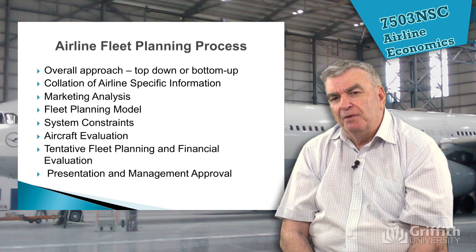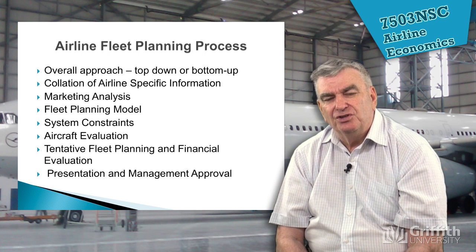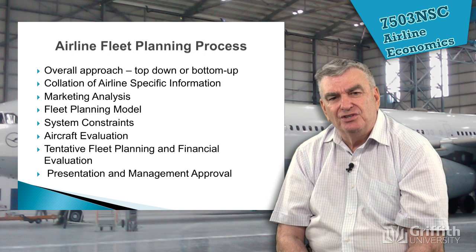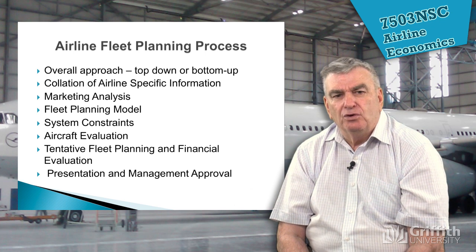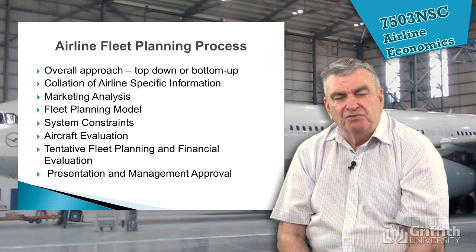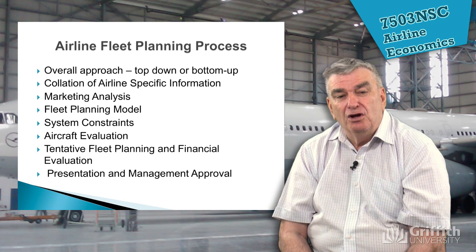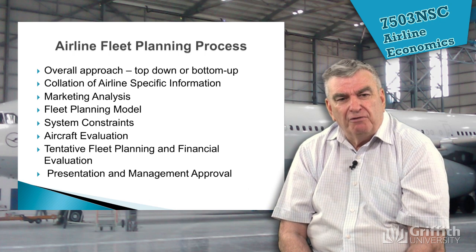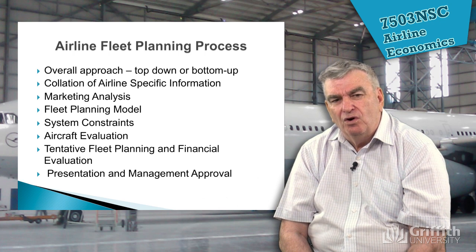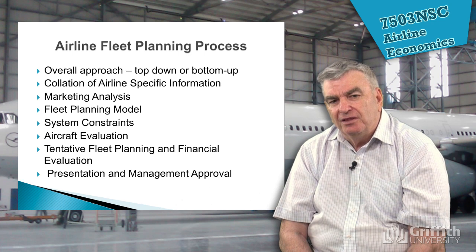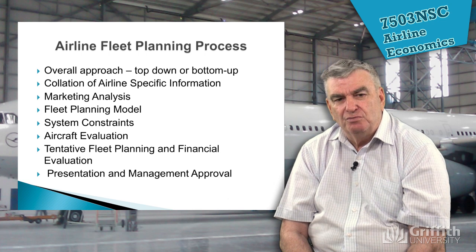But then we have to have a bottom-up approach where we have to look at all the individual routes themselves, the schedules that we're operating to, the particular economics of those operations, and say, well, how is that going to affect our planning? We're going to have to take a look at putting the specifications for everything we need together, doing a marketing analysis, for example, finding out what our customers want, what's our fleet planning model, how are we actually going to plan for the future as to what we want, so that we try to consolidate the number of types down and also try to get as much commonality amongst our systems as possible.